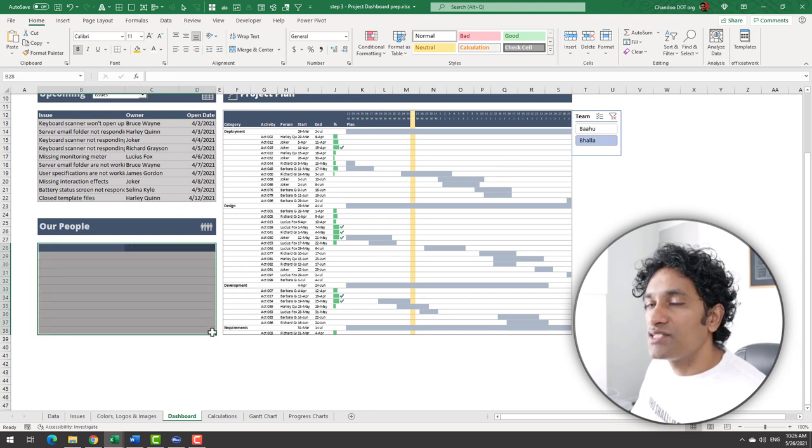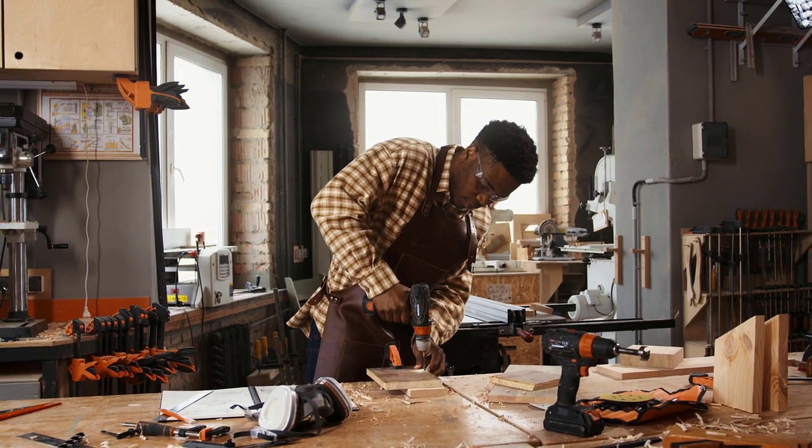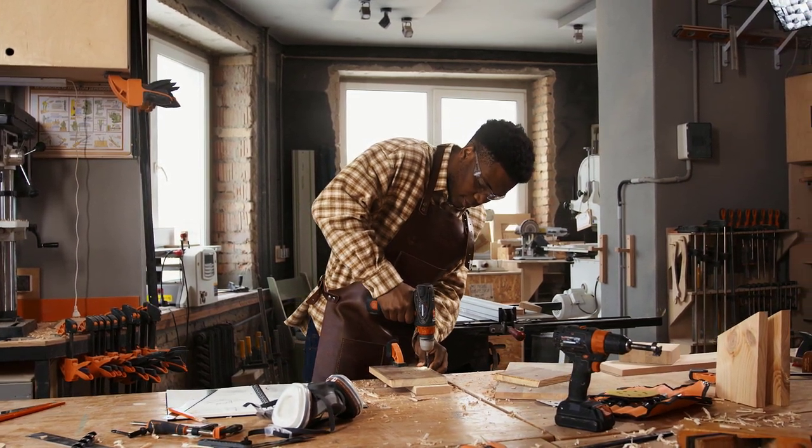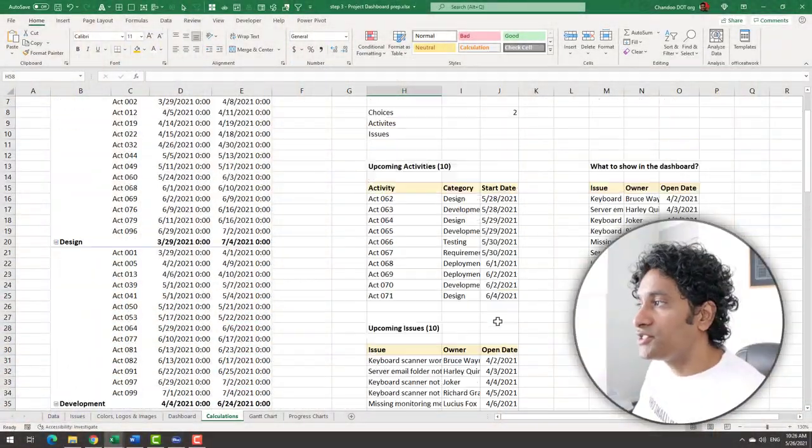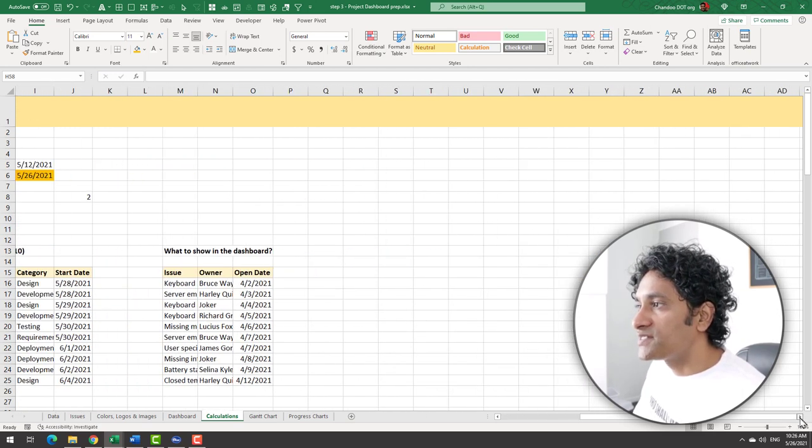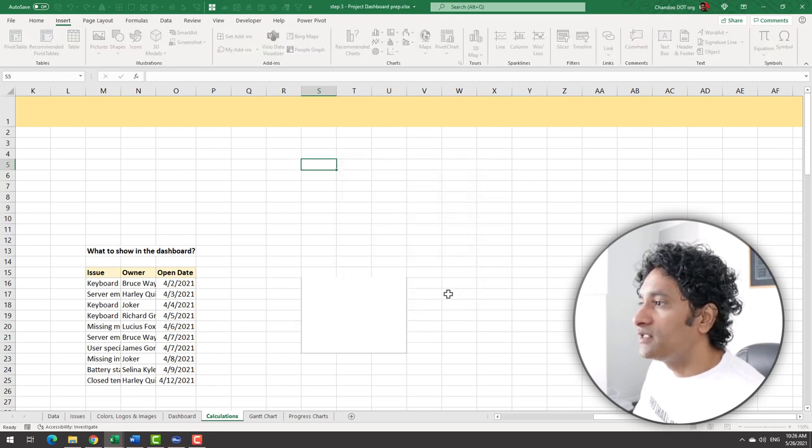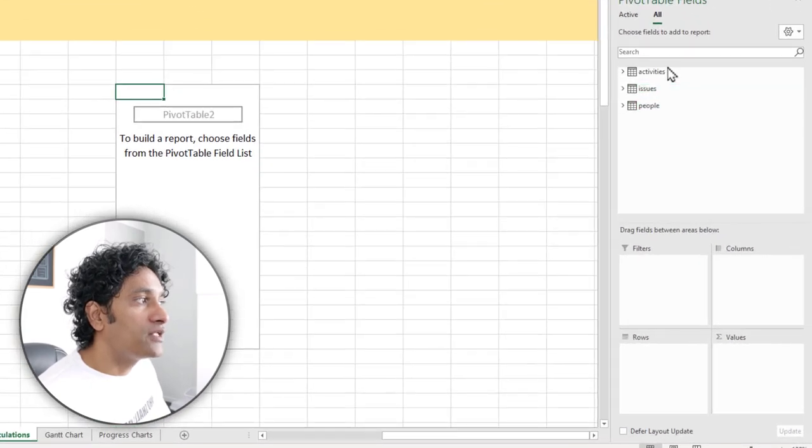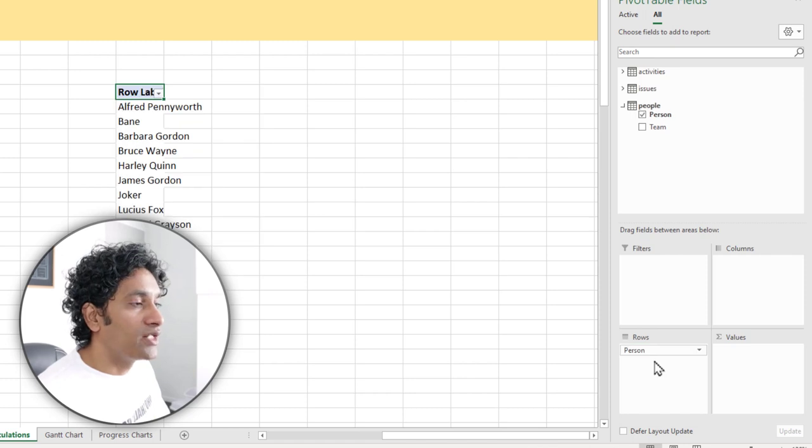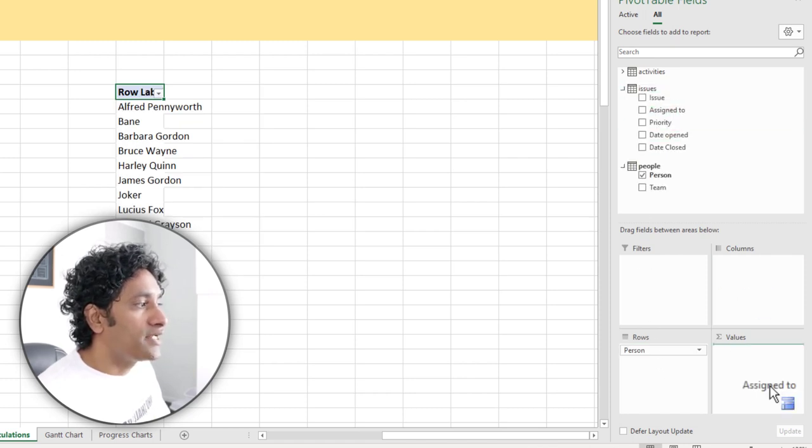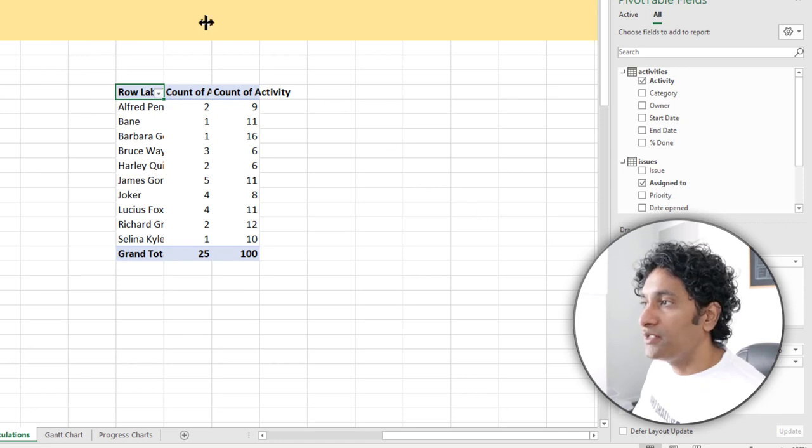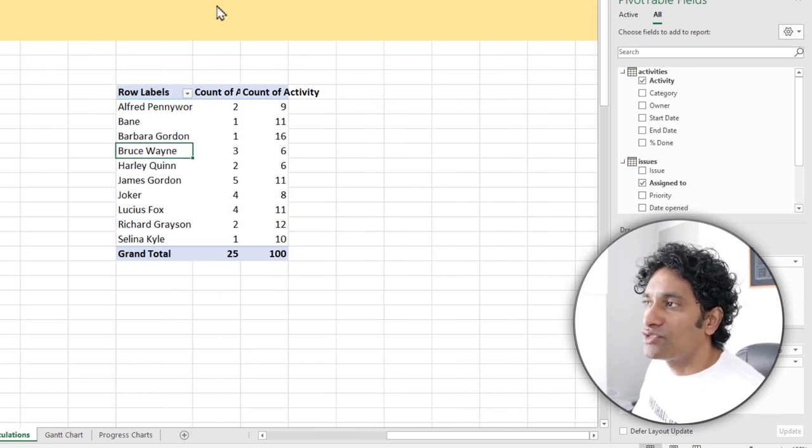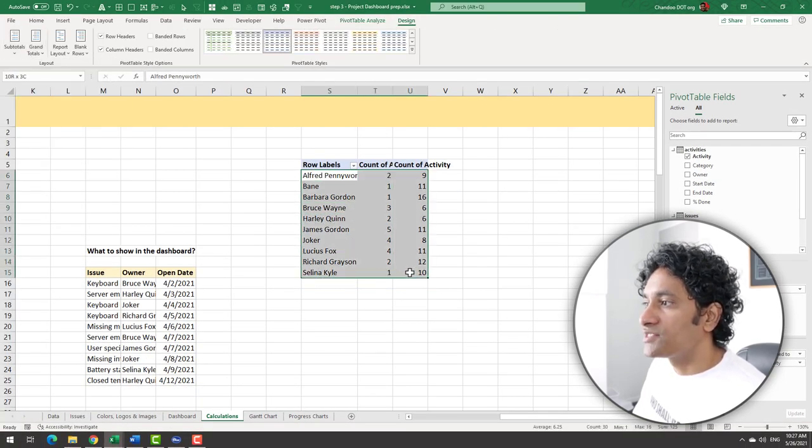Only bit remaining is our people and how much work they are doing. To make this, we need to construct a pivot table. So let's do that first. Whoa, not that kind of table man. The ones that you make in Excel. We'll go back to our calculations worksheet and find some empty space and add a pivot table. Just say insert pivot table and this will default to your data model. We have our people, issues and activities tables there. Let's load the people names into the row label area. And let us see how many issues are assigned to them and how many activities are assigned to them. So I can see how much work each of them are doing. And if you want, you can sort this on anything. I'm not going to sort, I'll just disable any totals on this pivot table. So we only have this data.